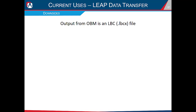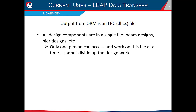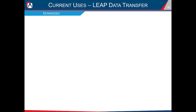The transfer does come with downsides. The output is an LBCX file — the consolidated file type — meaning all components including beam design, conspan, and pier designs in RCP are in a single file. Because of this, only one person can access and work on that file at a time, so you can't divide up the design work. Additionally, if that single file ever gets corrupt or damaged, you lose everything in that design file.